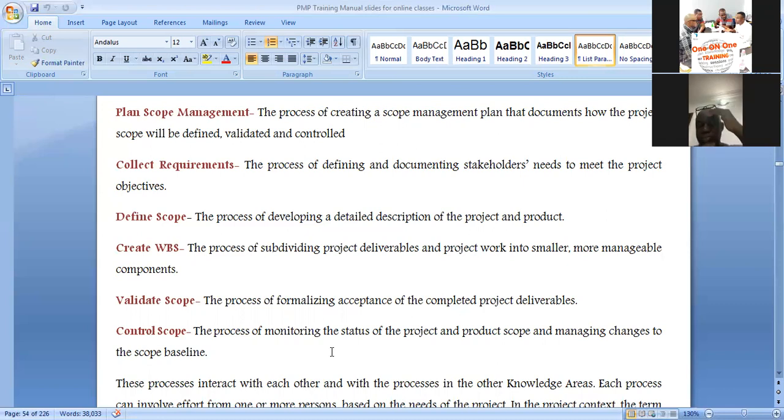So where they are conflicting, what do we do? We ensure that we unify what is to be there by talking to them. And certain times the stakeholders may not have equal stake. So at the time where votings would be made for certain things, the one with the highest stake may likely win. So that is about when we're dealing with different stakeholders.